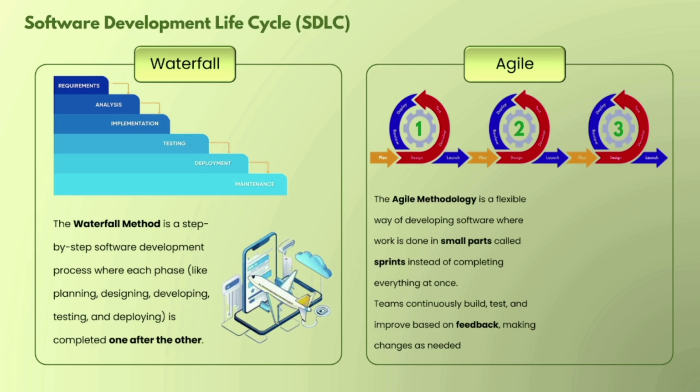In agile methodology, it is divided into sprints. In the first sprint, they come with 3 to 4 features. Developers start developing them, testers test them, and then it is deployed to production. Then 3 features are already there in production. In the next sprint again 3 features come, with the same process. Now in production it becomes 6 features. Again 3 features come, the same process happens and it is deployed. Now in production there are 9 features. In this way it is building gradually. It's a gradual process, we can call it.